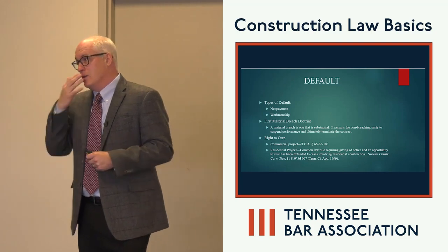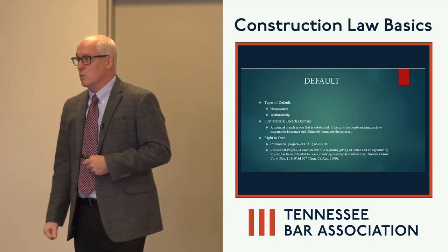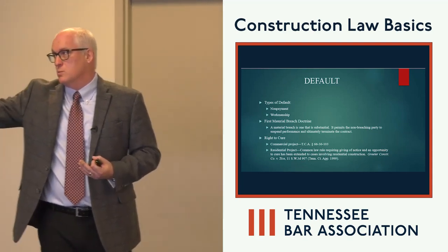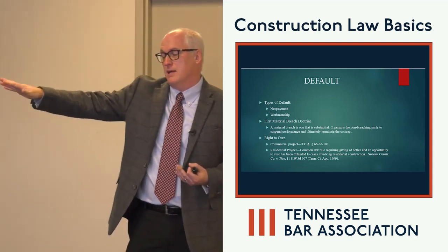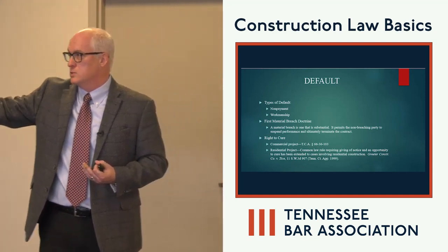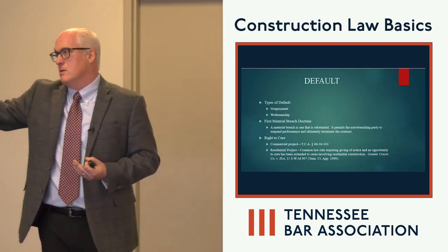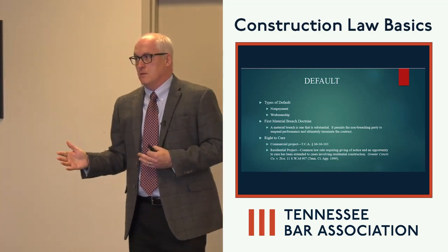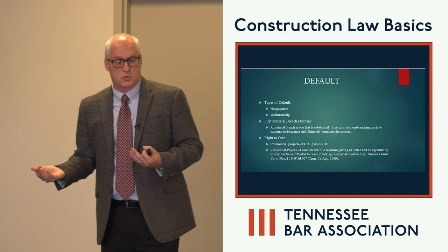One thing to keep in mind, and I'm preaching to the choir on this, is the right to cure. There's actually a statute for commercial projects. I think it's defined as just commercial projects, although you can use it as a guidepost for residential projects. But there's a bunch of case law that has extended the right to cure to residential projects as well.